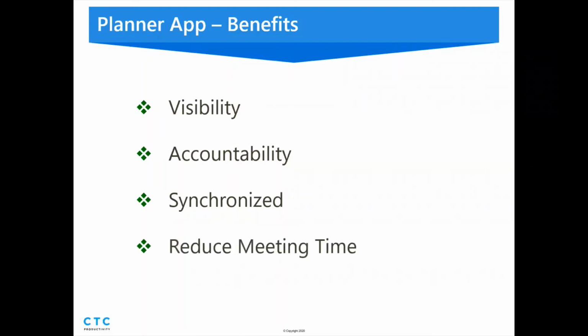And one of our favorites is that it reduces meeting time. We're advocates of everyone using Planner to do the status update before you go into the meeting, so that when you're in the meeting, you don't go around the room and have everybody give an update on how they're doing on their action item. The expectation is everybody updates the plan going into the meeting, and then in the meeting, we look at where we're behind schedule, and that's where we focus the time discussing any problems around that action item. So we really like Planner.